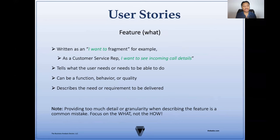Now let's look at the feature, or the what. The feature is written as an 'I want' fragment. For example, 'as a customer service rep, I want to see incoming calls.' This tells us what the user needs or needs to be able to do. It can be a function, behavior, or quality, and it describes the need or requirement to be delivered. One thing to note here is that providing too much detail or granularity when describing the feature is a common mistake. Focus on the what, not the how.